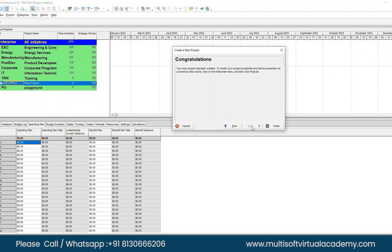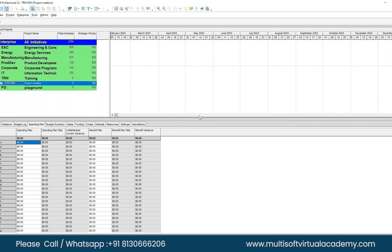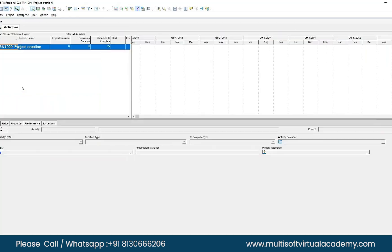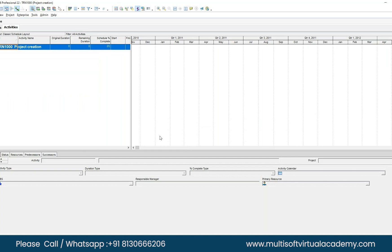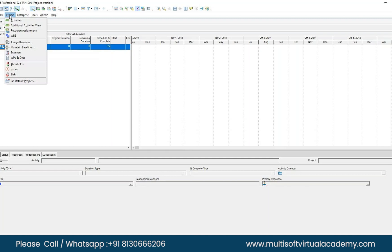Click Finish — your project is created. Now select that project, right-click, and choose Open Project. It will take you to the Activities page. The first thing we're going to do is add the WBS. Go to the top menu — click on Project, next to Enterprise — and click WBS.